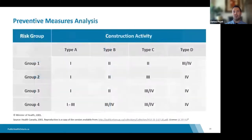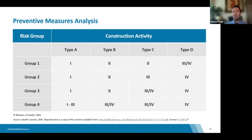Now that we've reviewed these two factors, here is the actual matrix that cross-references them. The risk groups are along the left and the CRMD activity type is along the top of the table. The preventive measures — PM1 through PM4 — are in the field. These give us clues on how to act and what measures to ensure contractors follow. Once the preventive measure category is generated, the level of prevention required is outlined in the reference document.